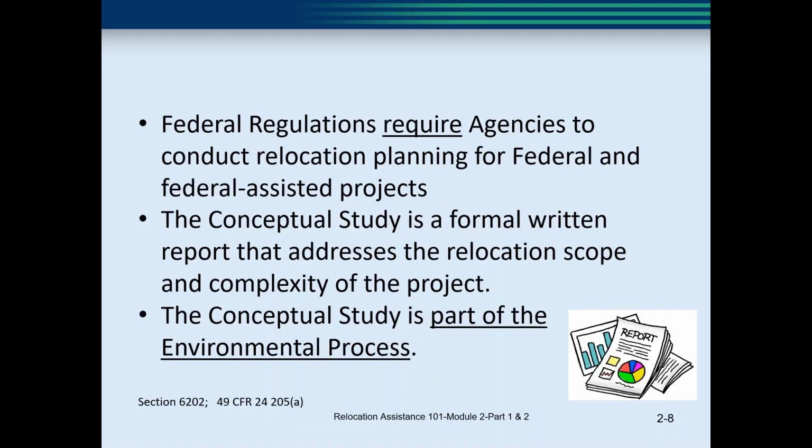First we're going to talk about the early planning. Section 6202 of the ODOT Relocation Manual and Title 49 CFR states that the agency will conduct relocation planning for federal and federally assisted projects. To comply with this law and this requirement, ODOT requires a conceptual study.